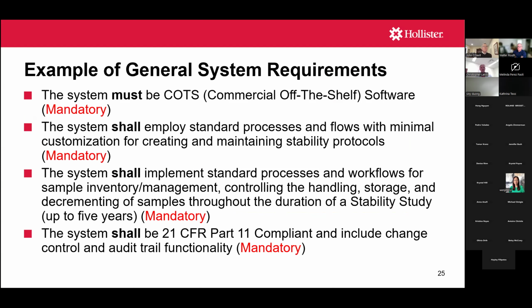So let's go through a couple examples. So again, this was in the category of general requirements. It was mandatory for us that whatever we selected was what they call COTS, commercial off-the-shelf software. So we didn't want some customized solution. Mandatory, of course, 21 CFR Part 11 compliant. So these are things that we had for our general system requirements.